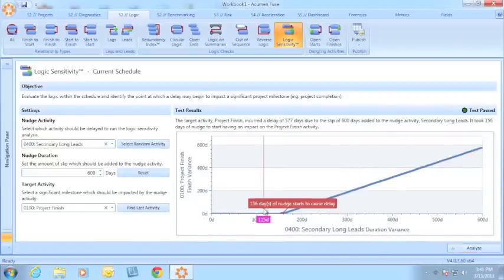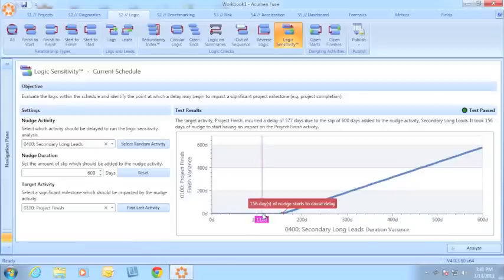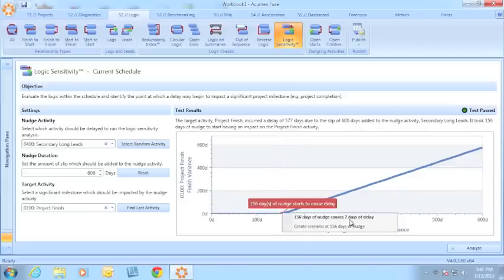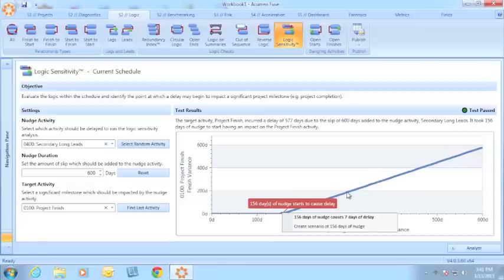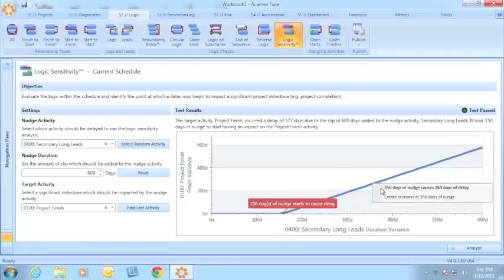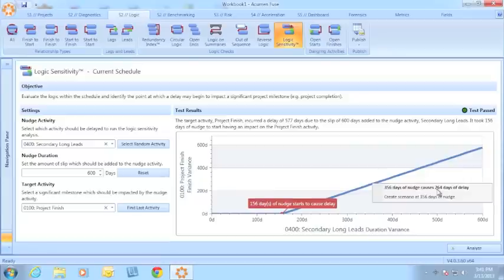What this graph is showing me is that for the first 156 days of delay, or if I add up to 156 days, there's no impact on project finish. However, at 156 days of delay, there's a 7-day impact on project finish. I can look at this at any point on the chart. So when I add 356 days of delay, I get a 264-day delay on project finish.